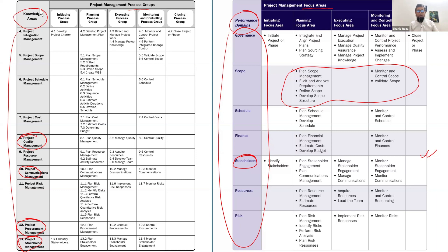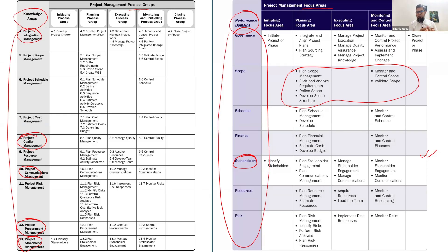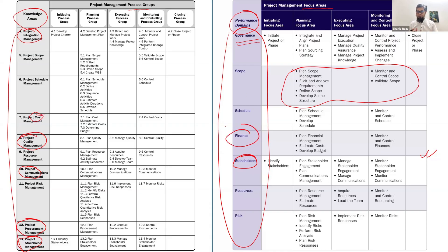There are also a lot of wording changes in the performance domain names and in the process names. Integration management, which was a key knowledge area combining and unifying all other processes, is now named governance. This is a very fitting change, as it speaks to the whole governance of project management processes. Cost management is now named finance, which is also a good change. These are the major changes in the knowledge areas and performance domains, including naming and wording.